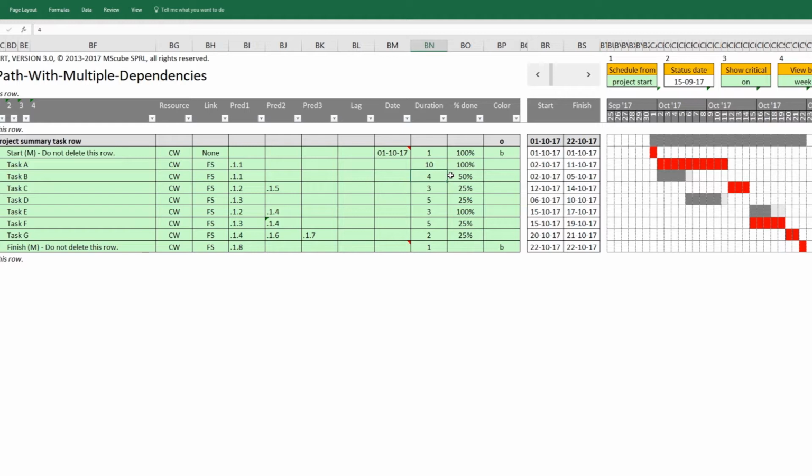On critical tasks, you have absolutely no margin or cushion. If any of your critical tasks slip, then your entire project will slip, which is something that you would probably want to avoid. The critical path also helps you know where to compress your schedule. If you want to make your schedule any shorter, then you've got to find ways to compress the duration of your critical tasks.